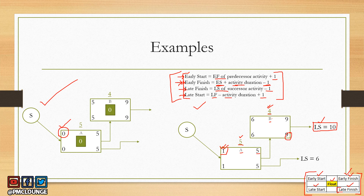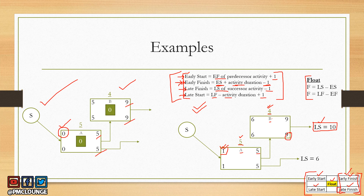Using these formulas, you can similarly calculate late finish and late start for activity A. When you compare both diagrams, you will notice that the early finish and late finish values are the same in both — nine, nine, five, and five. The only difference is in the early start and late start values. However, when you calculate float — which is late start minus early start, or late finish minus early finish — the float values for both activity A and activity B are exactly the same.